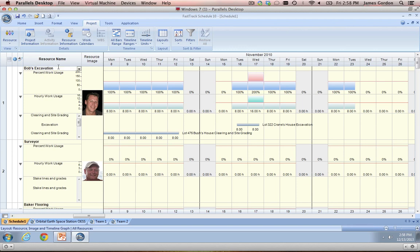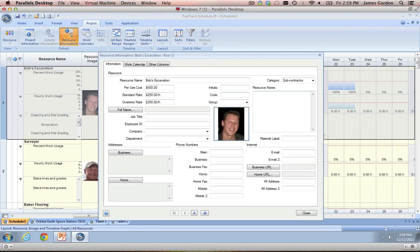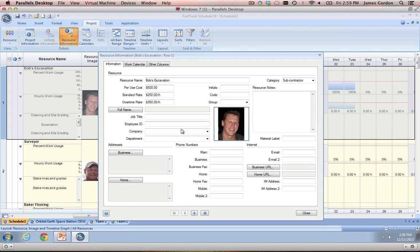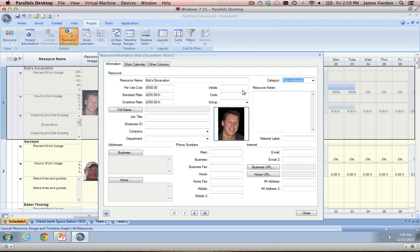One more thing I'll show you about the resource view is something called our resource information tab. Here you can enter in a lot of different information about each resource, whether that be their name, company name, company address, email address, phone number, or the category of resource. Probably the most important information you put in the resource information tab is the cost associated with that resource — if they have a per-use cost, a standard rate, or an overtime rate, you can put those in and then once you assign the resource to a task in your project, FastTrack will automatically calculate the cost associated with each resource.